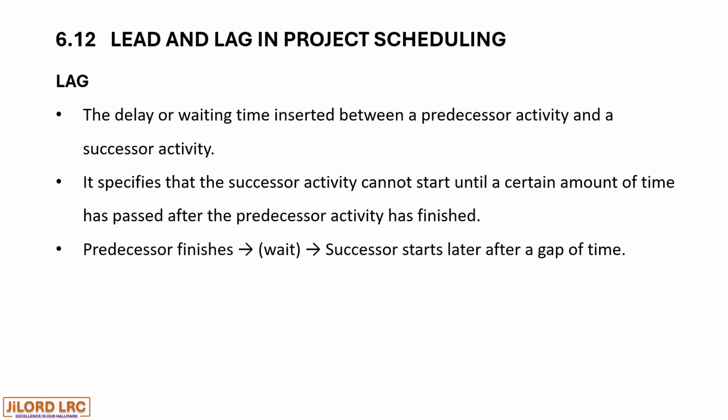Predecessor finishes, there is a wait, then the successor starts later after a gap of time. The lag time postpones the start of the successor activity. So this can lengthen the project completion date.